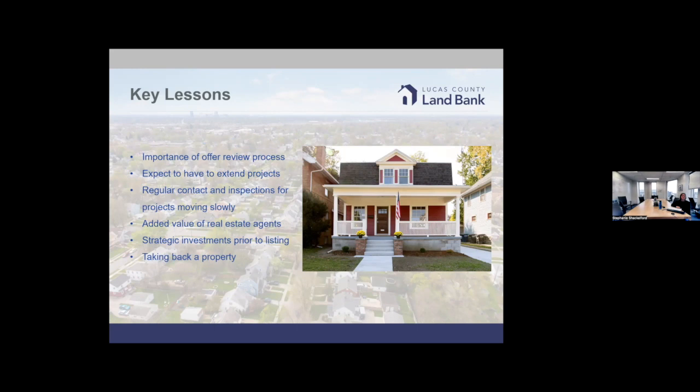The other thing I would say is, there are situations where we've had to take properties back. That also is something that you might expect to have to do, especially if you've been running the program for as long as we have. But it still is really just, I would say, maybe a dozen properties over the years that we've taken back, and they've all been mutual decisions. They've been in situations where folks got into the project, realized there was some kind of major damage that none of us could have foreseen. They started pulling up floorboards and realized there's a lot of termite damage or something like that. So we've decided to take the properties back to solve the problem instead of just sticking it on the person who had not foreseen that.